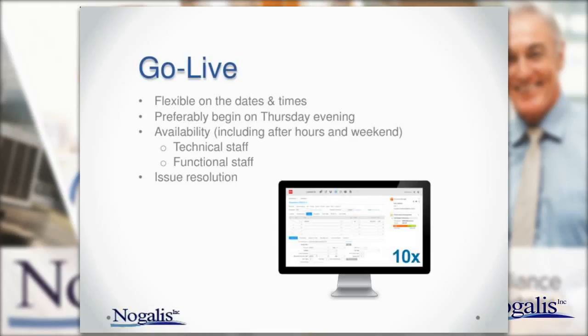It's never going to be one of those things where the business says, oh, we don't use Lawson this week. No, you're using it every day, every week. I understand that payroll weeks can be very scary, but at the end of the day, this is going to take one weekend. There's a go, no-go decision at some point in that weekend, and if it's a no-go, you switch back to your 901 system, nothing's lost.